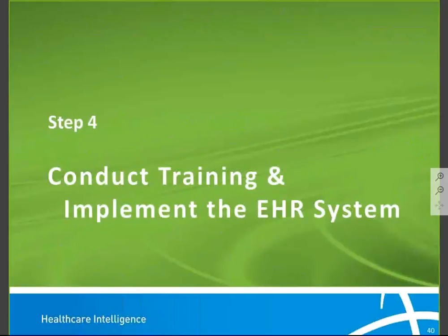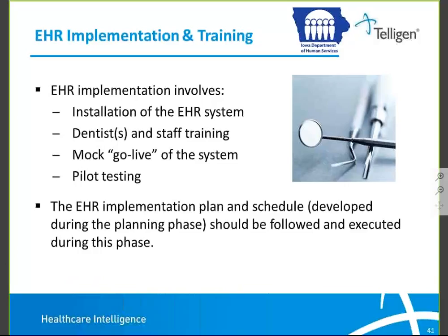Okay, step number four, conduct training and implement the EHR system. EHR implementation involves the installation of the system, the dentist and the staff training, going through a mock go live of the system, and then doing the pilot testing. So it's kind of a phased process, and again, the vendor, the product that you choose, and your trainers will walk you through all of this as well, but these are things you need to be aware of to make sure that these things are happening as they are supposed to.